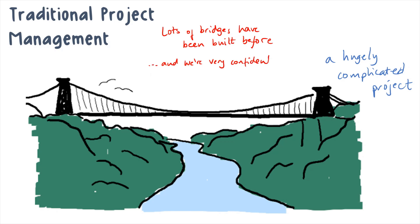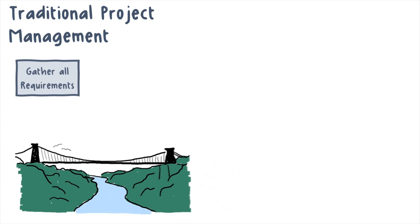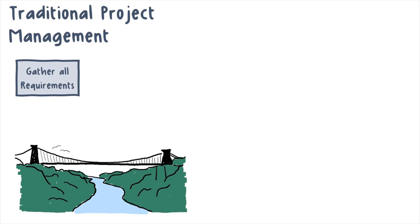We're also very confident that we do actually need a bridge. So there are things we do know even before the project starts — we have a very tangible, physical thing that we're producing; it's industrial work. For this kind of project, we will spend considerable time up front gathering requirements for our bridge — a complete list of what we need the end result to achieve: how many lanes, what traffic capacity it needs to support, whether we need pedestrian access, and a million other things.